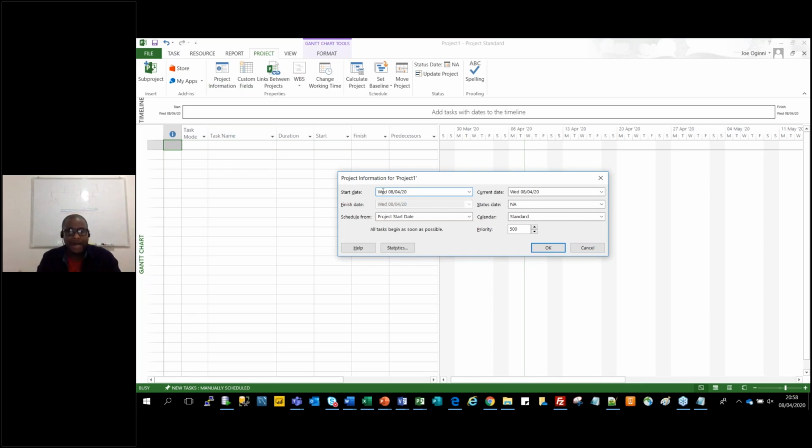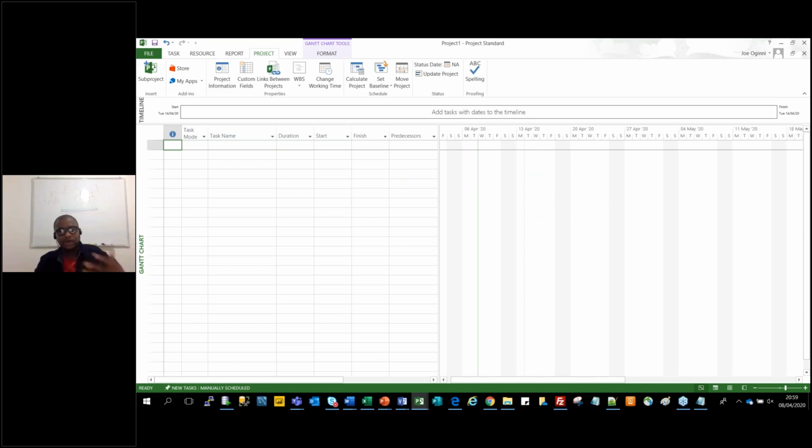It's recognizing today as the start, but if I don't want to use today, I'll say my project is starting, say, on Monday the 14th. So that's the start, and that's what I need here. I click OK, so MS Project understands when I want to start.